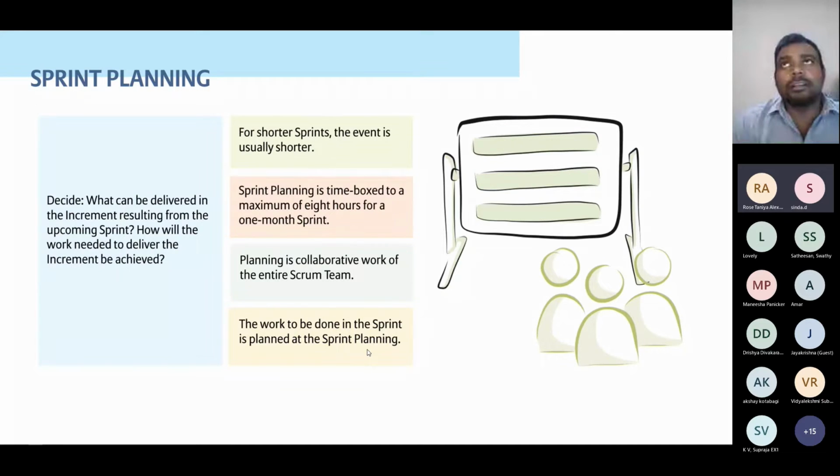Make it very simple. No detailed discussions, because those discussions will eat all of our time. If there is no clarity, can we pull it back? Because we can't really commit. If we have a lot of unknowns, a lot of discussion required, a lot of technical details required, it's not actually ready for sprint. So as part of planning, create the task, make it simple, and put it in the sprint. We can start working on it.